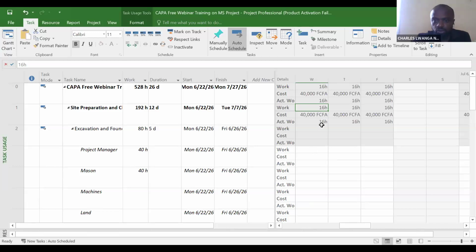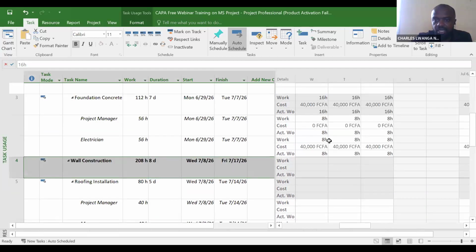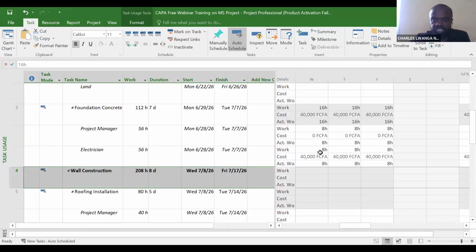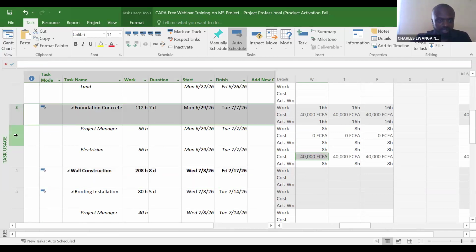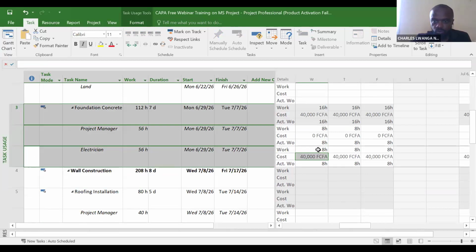It gives the total hours put in, the total amount that has been used, and the total hours that have been used so far in the project in that particular activity. So it's cumulative. For example, 3, you have this and this. It will give the cumulative from here, here, here, here, right up to the foundation, which has foundation concreting, which has what? 16 hours.